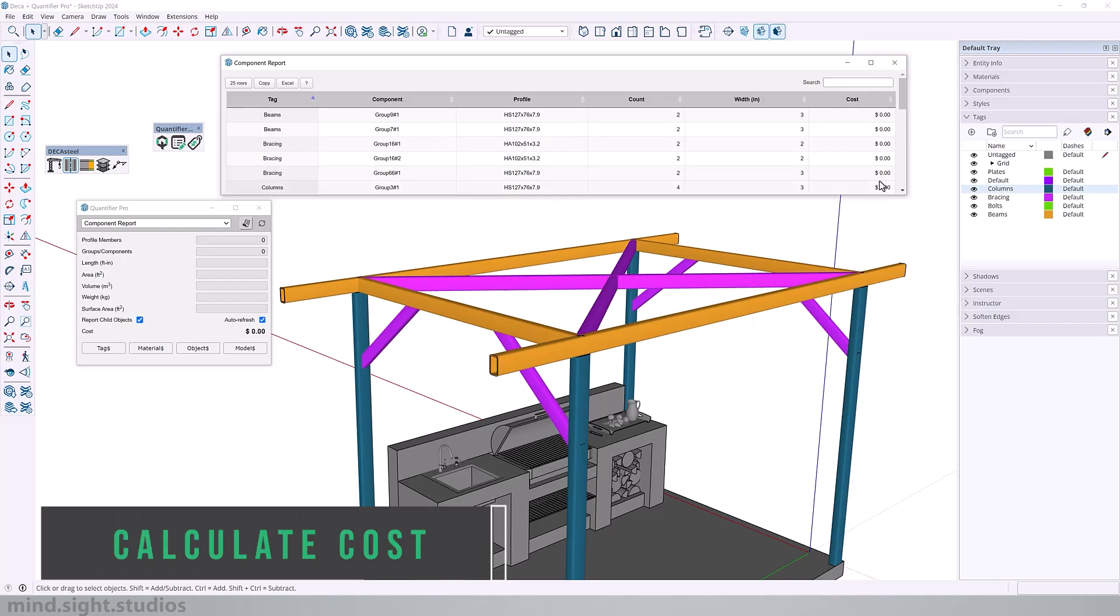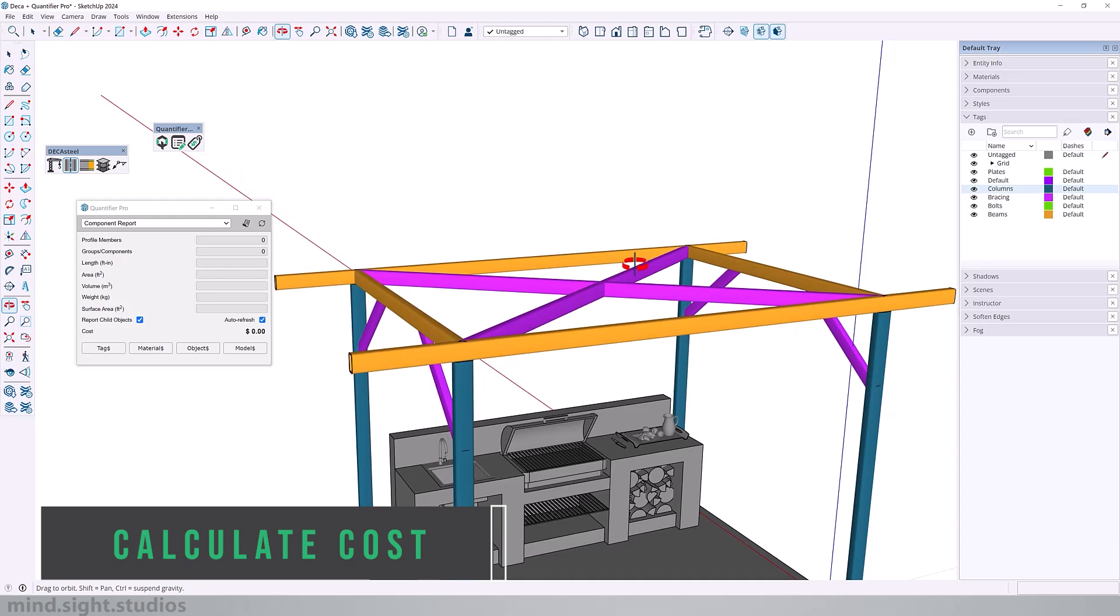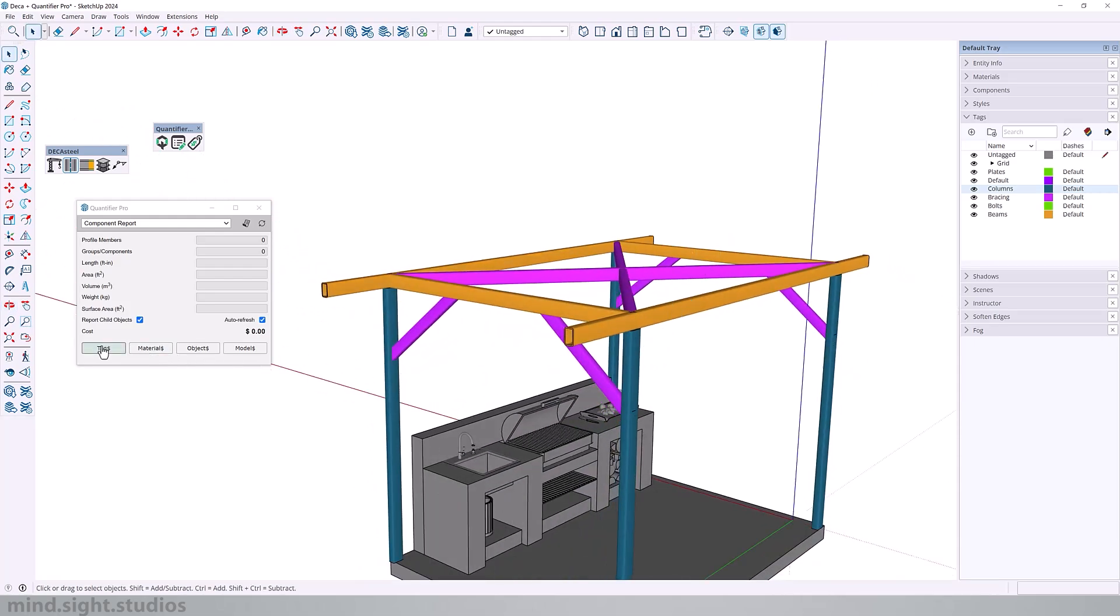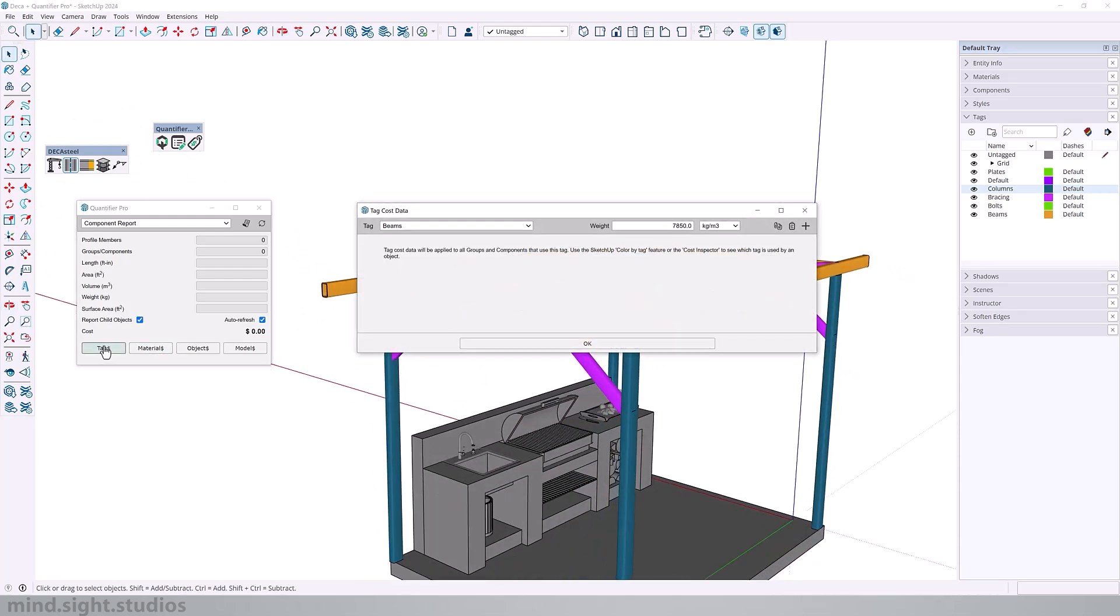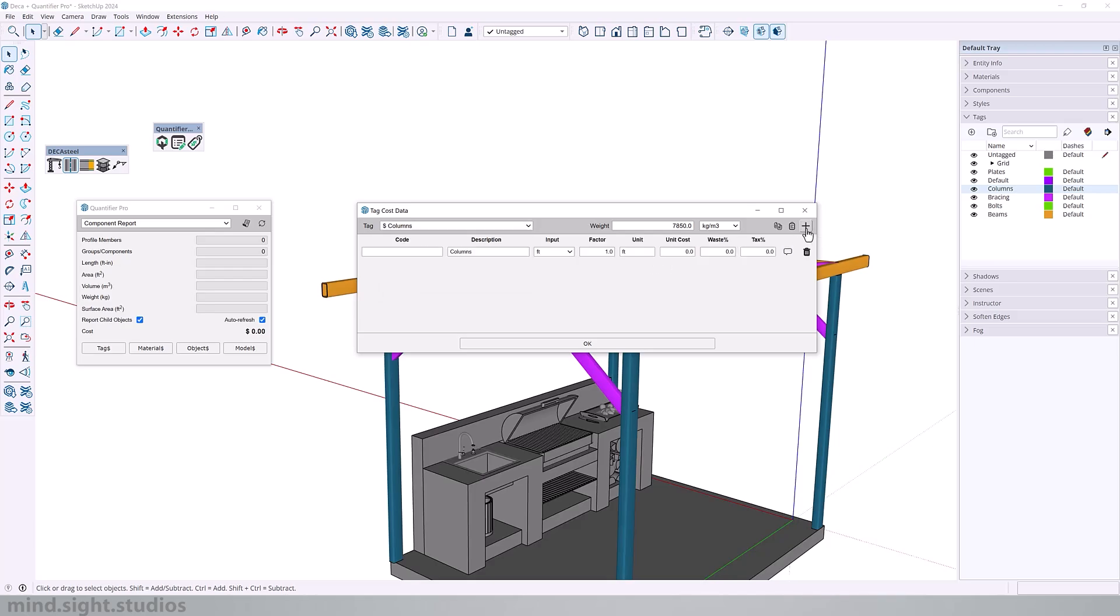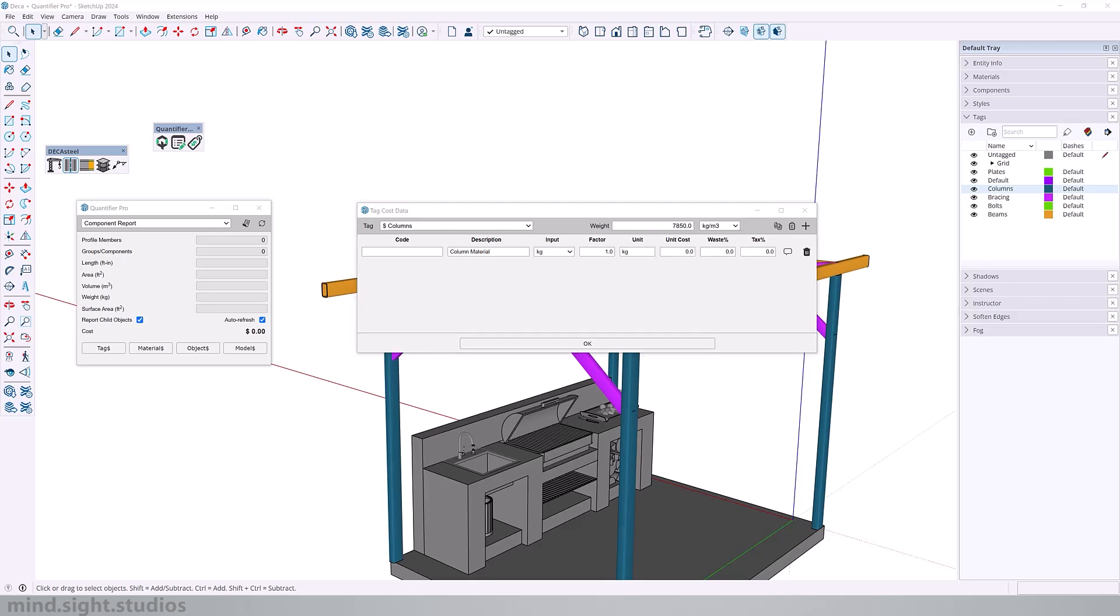So now we're in a good spot to calculate the cost. So calculating the price is actually just as simple if we go over to the tag. So let's say we want to add a cost value to our column. And what we need to do is add a cost item. So to add a cost item, you want to click on this plus icon. And we've got a new set of information that we could change. We can change the description to the column material. Input, we would change this to kilograms. And the unit will also be kilograms. For this value, we need to find out the unit cost of structural steel per kilogram.